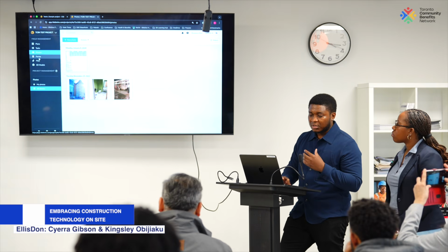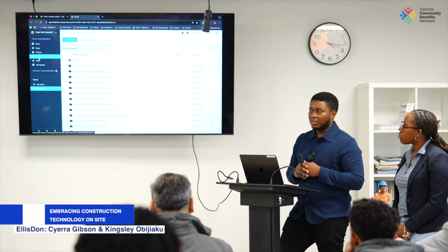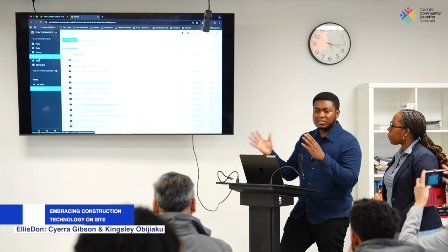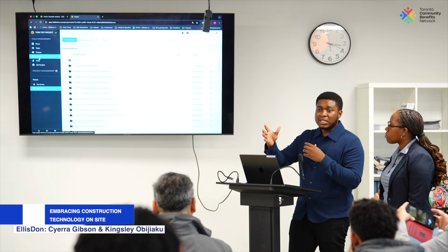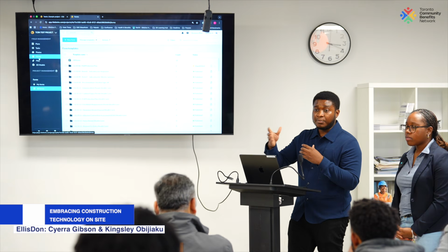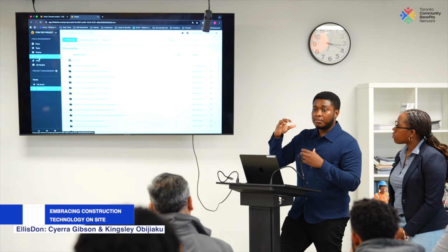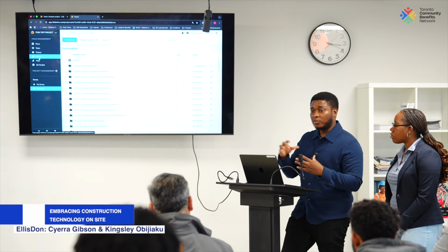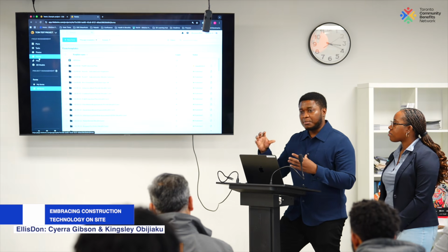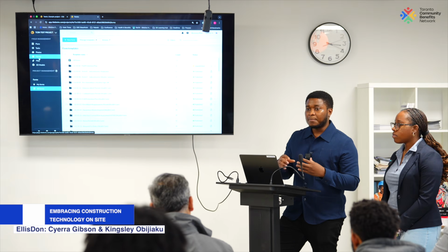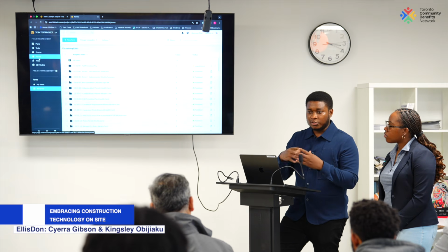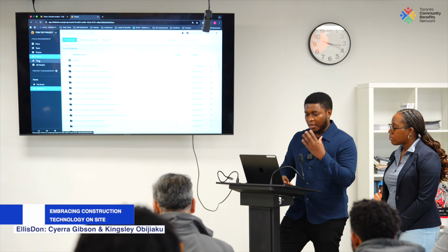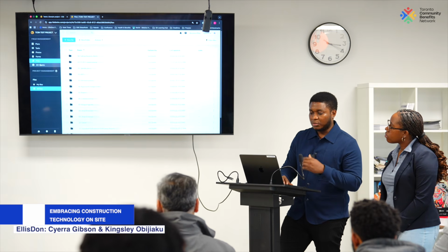We have forms. Think of forms as things that we want to track. We used to call them checklists. They're two different things. They still exist. But if we assign you a task, if you're fixing doors, for example, and we want some checklist items as part of that process, the quality aspect of the process, we expect you to fill out those. And there will be a time and date stamp on most of these forms. It's a form of audit, like log tracking, just so we know when and what happened and who's responsible for it. The files is also something that we upload as well.